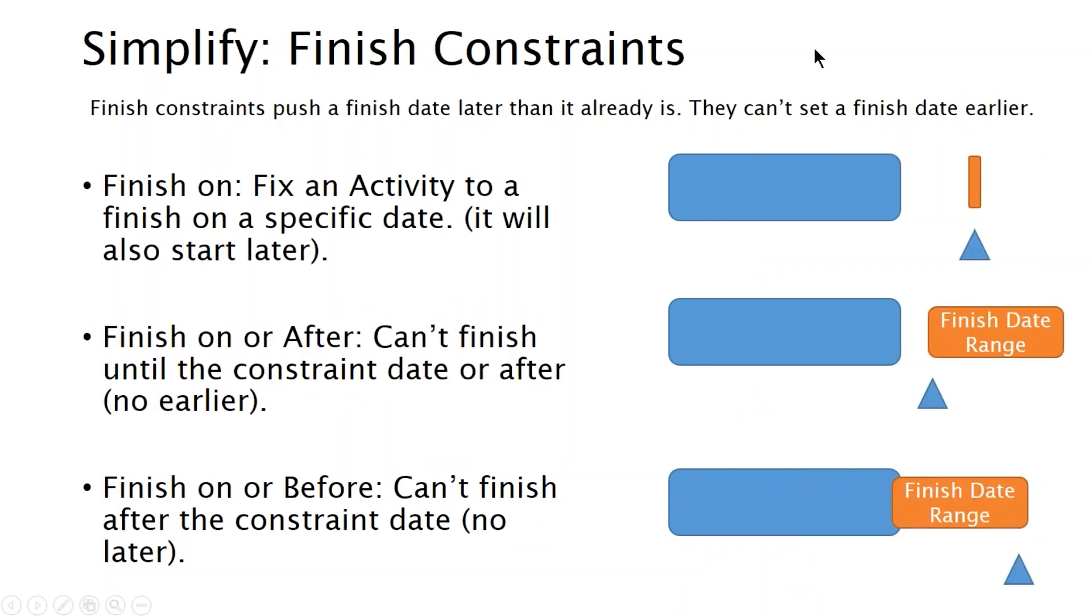The same way start constraints pull an activity into the future by their start date, finish constraints do the same thing. They pull an activity into the future, but by the finish date. So you can't ever do it in the reverse direction. You can't set a finish date earlier. I mean, you can, but it's not going to work is what I'm saying. So once again, we have finish on, finish on or after, finish on or before. And finish on, again, picks a very specific date and says, finish this activity on this date. So again, the blue box represents the original activity. You could imagine this activity being moved to finish on this orange bar. So that's the new finish date for the activity. And the start date would be pulled into the future as well. Now, finish on or after, again, leaves me open to having a date range in case my logic is pushing things later. So finish on or after says, you know, finish this activity on this date, or any time after that is fine with me as well.